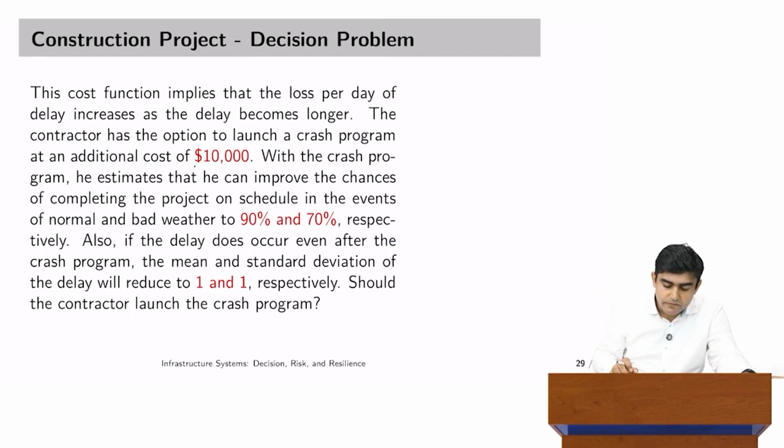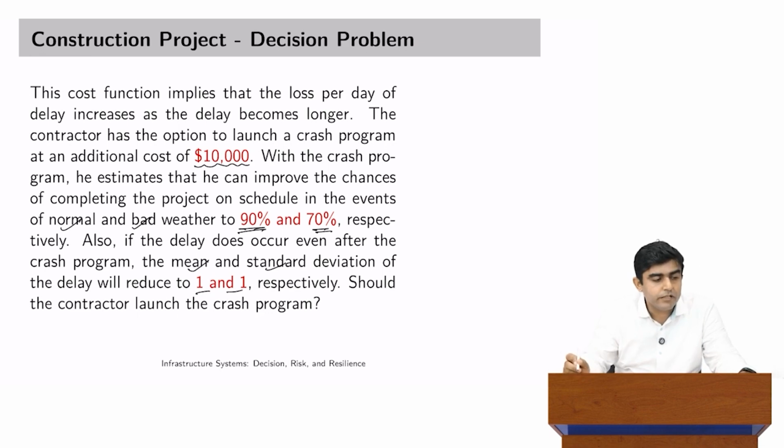Also, it is further stated that the contractor has an option to launch a crash program. So, they can deploy more resources at an additional cost of $10,000. With the crash program, he anticipates that the chances of completion of the project on schedule in the case of normal and bad weather would improve to 90% and 70% respectively. Also, if delays do occur even after the crash program, their mean and standard deviation will be reduced by one day.